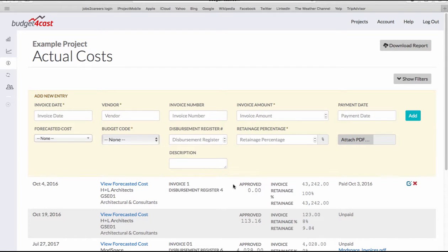On this one, we'll be covering actual costs. Actual costs are really just your invoices or costs that you've fully incurred, not just committed to incur. Really, that typically means the work's been done and you're being asked to pay for it. On the actual cost module, we have opportunities to enter in all sorts of information for you to keep track